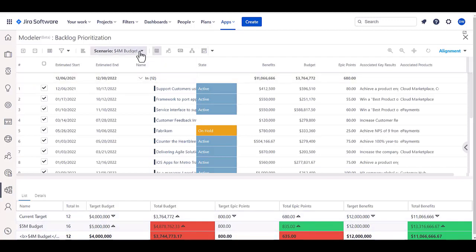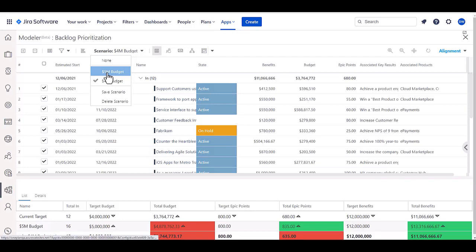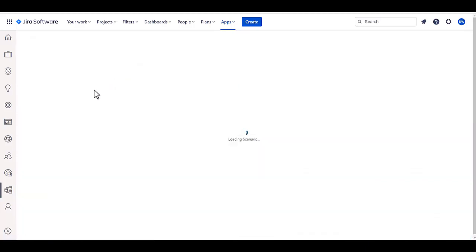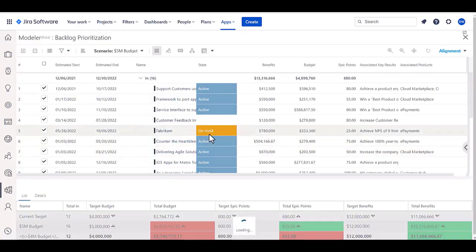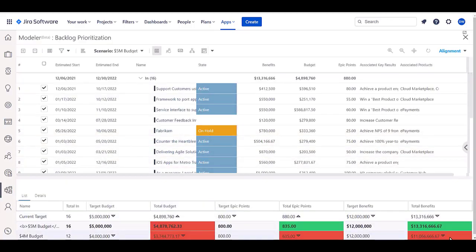But if I also wanted to look at, say, a five million dollar budget, it might say, if I can get that extra million dollars, could I get another 2.3 million dollars worth of benefit in order to do that? So, the idea is I can compare alternatives and look at the details around those.